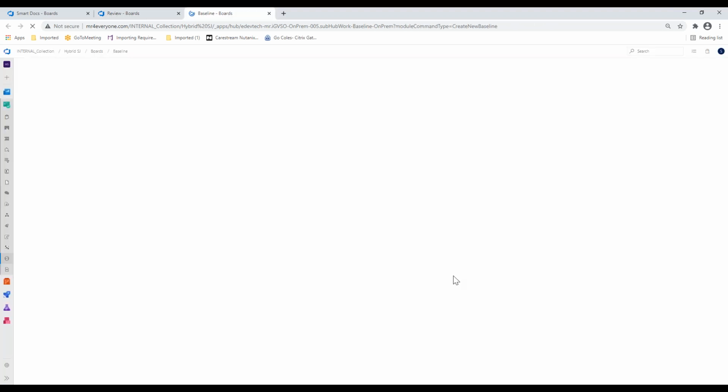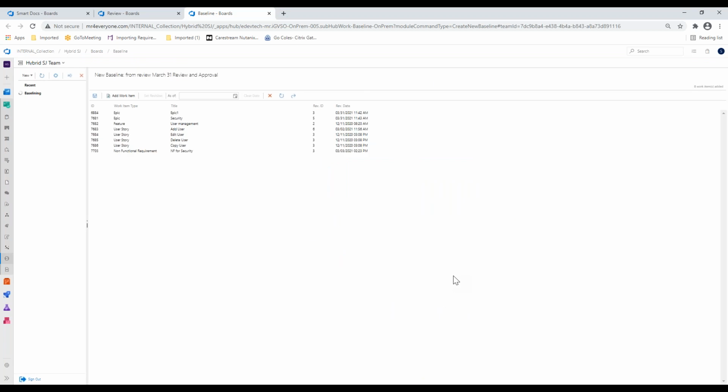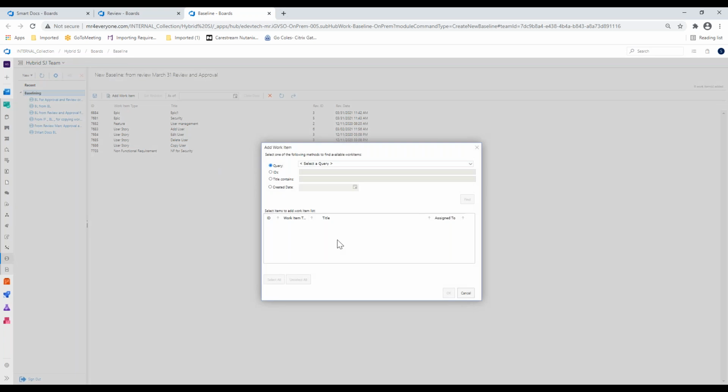and done. Right now that I've created this, taken a picture of my work items, I still have the capability of adding more work items too. And folks, baseline is one of the tools where you can go back in time. Remember Back to the Future, right? We can go back in time and we can say, well, show me what work items look like on March the 2nd. I don't know if I did any work on that day. Well, I did, look at that.